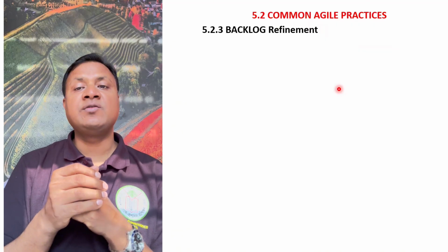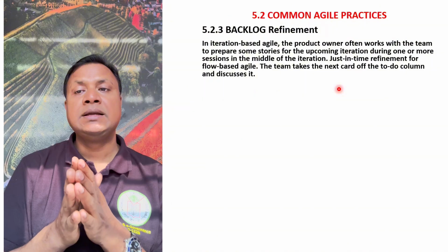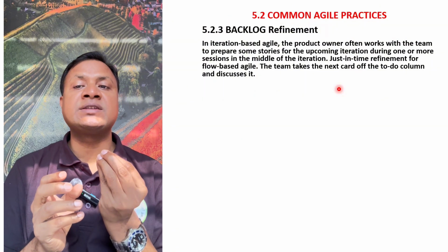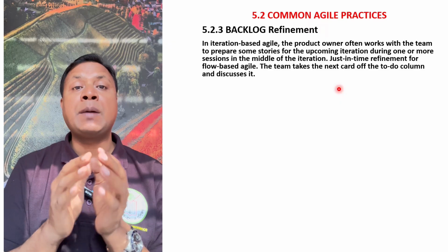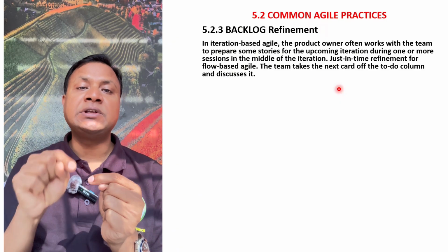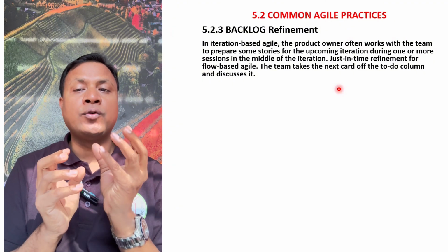Now the backlog refinement. What is it? In iteration-based agile, the product owner often works with the team to prepare some stories for the upcoming iteration during one or more sessions in the middle of the iteration. Just-in-time refinement for flow-based agile.